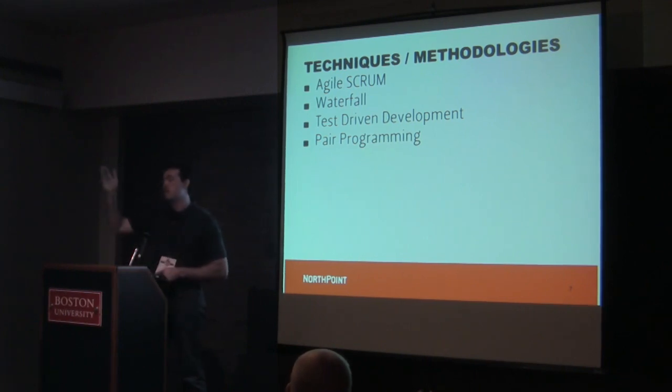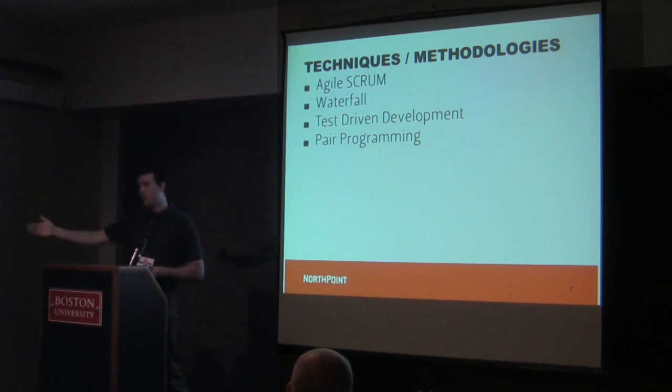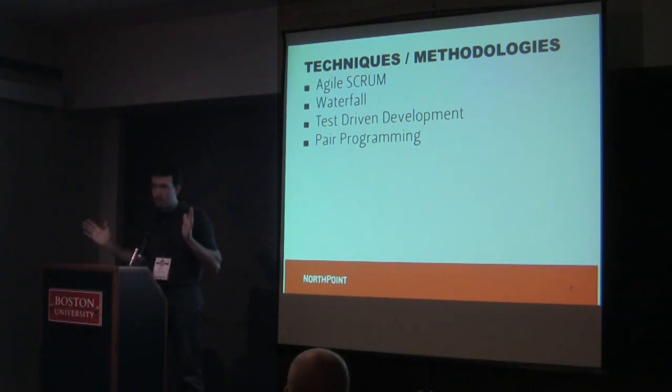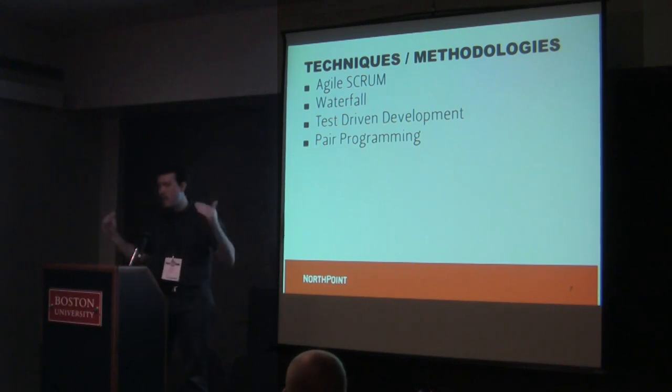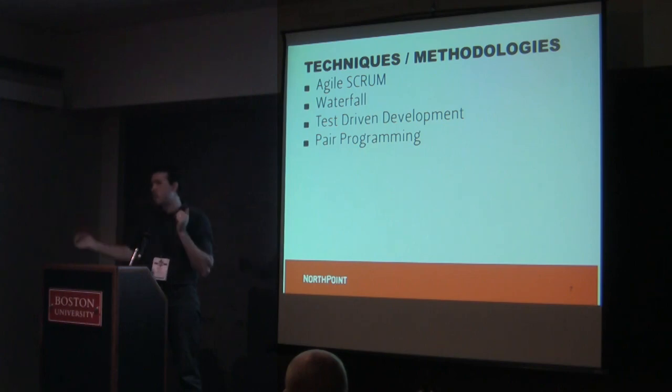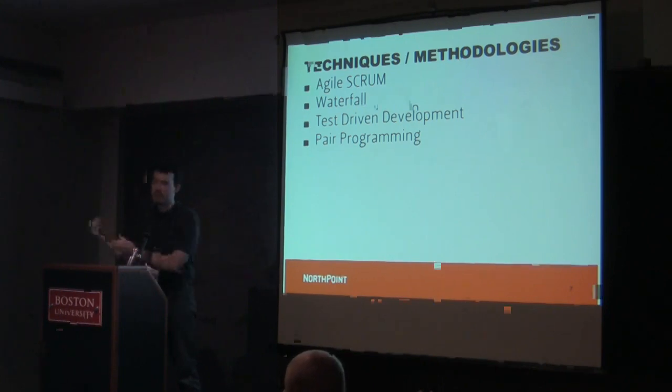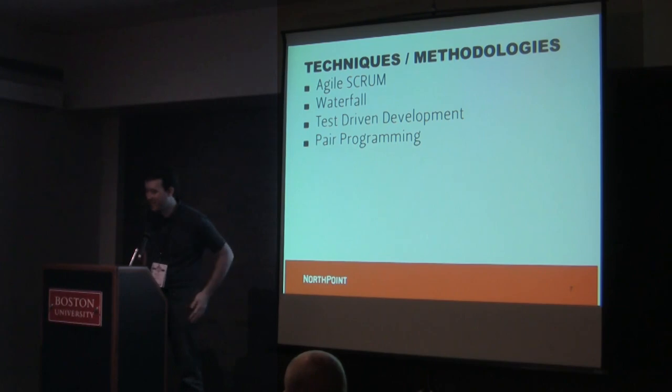And then you can't start your visual design until your UI is done. And then you can't start your development until your visual design. Traditional waterfall really never was adopted very well, other than really software development, but in web development, everything always crossed over. You always started your design before wireframing, always started development before designs, and that's still the case today. Sometimes you're actually finishing your development before design finishes.